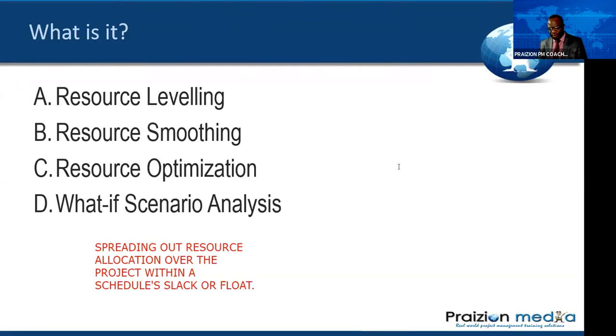Why don't we take a look at that example? Because I know you guys must have seen this. If you look at page 212, you can see resource leveling, what it does. A project that should have 2 days in duration, it has now spread it out to 3 days. So it did not have any consideration for the slack or float or whatever. It said, no, I'm just going to spread out the resources, which means instead of Phil working 80 hours this week, I'm going to spread out the other 40 hours into the many weeks ahead. I don't care. However it's filled up, as long as Phil doesn't work more than 40 hours, I'm just going to do that.